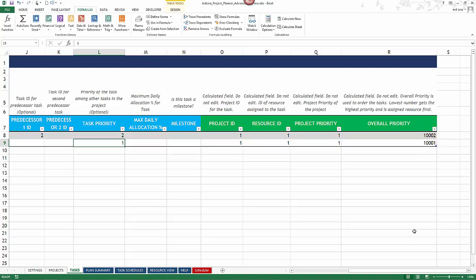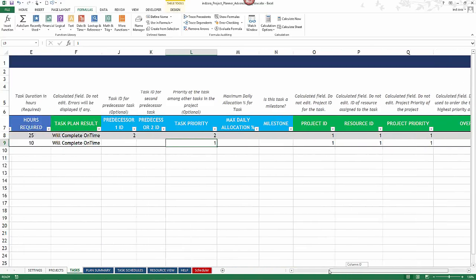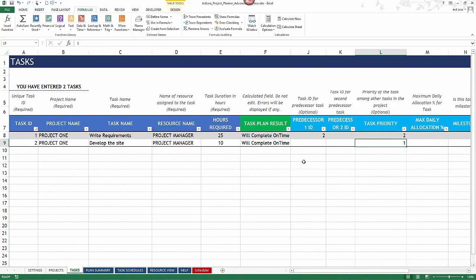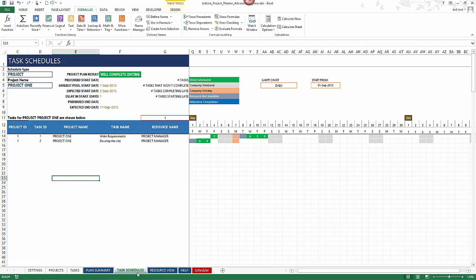For example, 1001 is higher priority than 1002. You don't need to edit those values — the template uses them to automatically schedule all tasks at a daily level across all projects. If you have any questions about circular references in project planning, please leave a comment and thank you for watching.